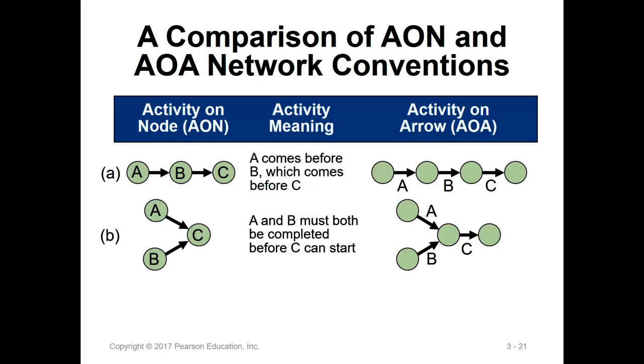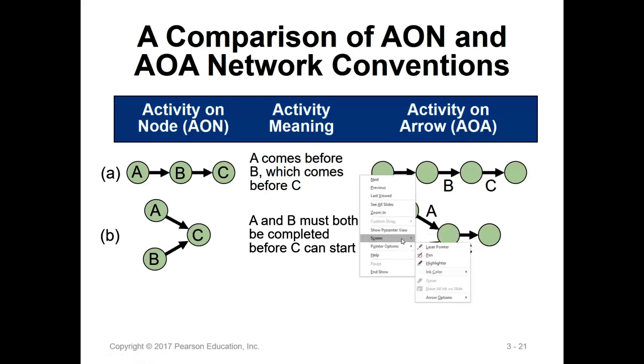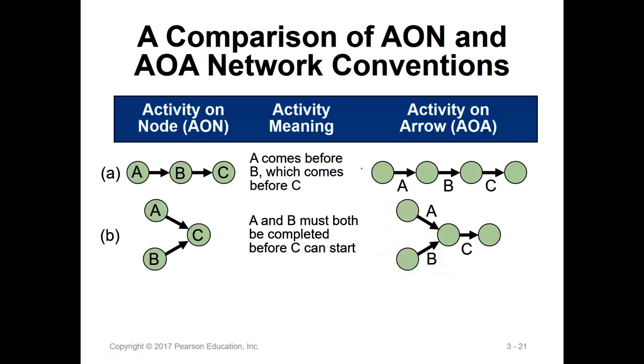You just put arrows. A is the activity on node, so you have the circle representing the node. And activity on arrow says, oh, this one, A, is the activity. And then this is what they call the event. Circle is event, circle is event, circle is event here. But it's very confusing sometimes, okay? This technique, the pointer, and then they call here the activity. And this is called the event. So the circle is the event.